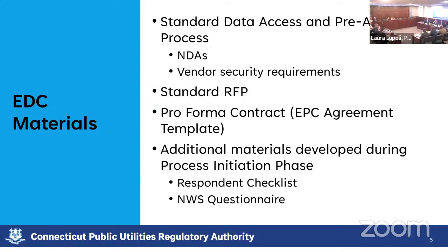So just very briefly, I think that standard bid procedure information that's given to one bidder must be made available to all bidders. So if an affiliate of the company were to bid in, they would have exactly the same access to information as everybody else. And just to chime in there, regarding UI's affiliates, our compliance department reached out to our affiliates, and none of them are interested in bidding into our NWS projects.